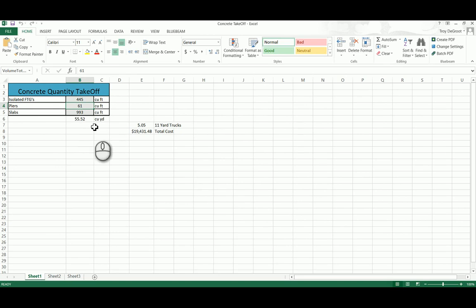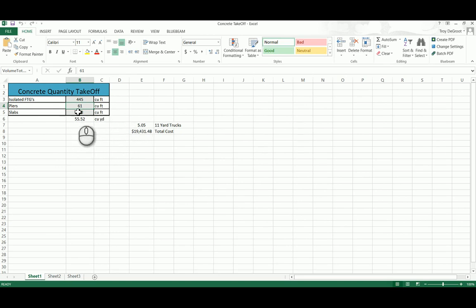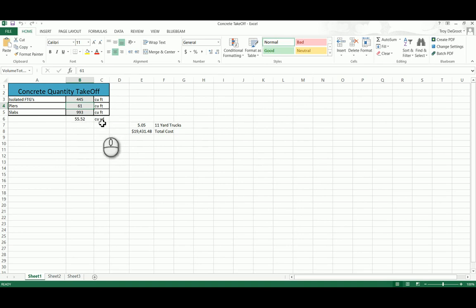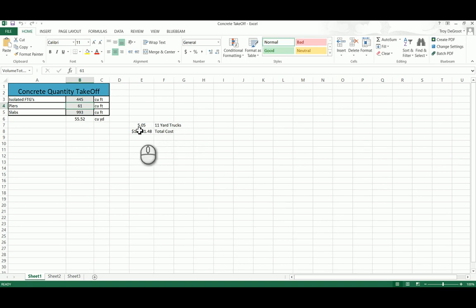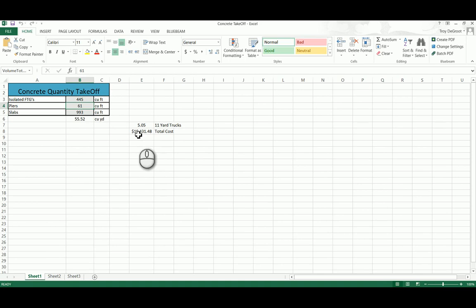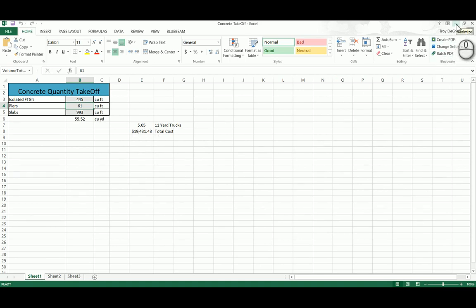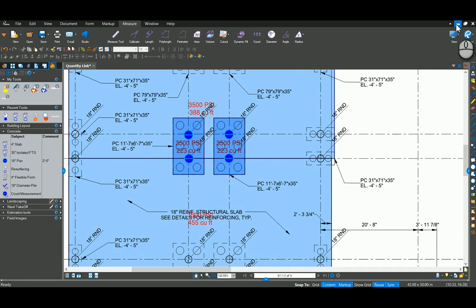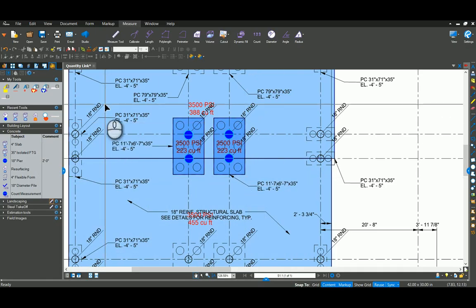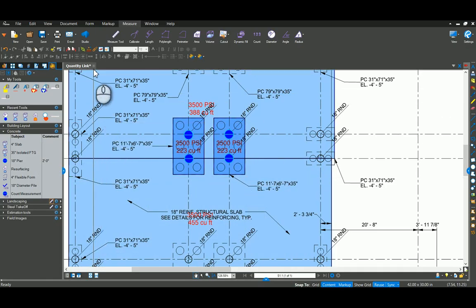Now once you're in Excel, you've got the power of doing whatever you want with these quantities. I added up all these cells to come here, put the formula in there for a cubic yard. Assuming it's 11 yard truck, this is how many trucks we need. And I guessed at a price, so this is what that's going to cost. So a very nice way of doing your estimates. You can put all kinds of things in here. That is the quantity link.